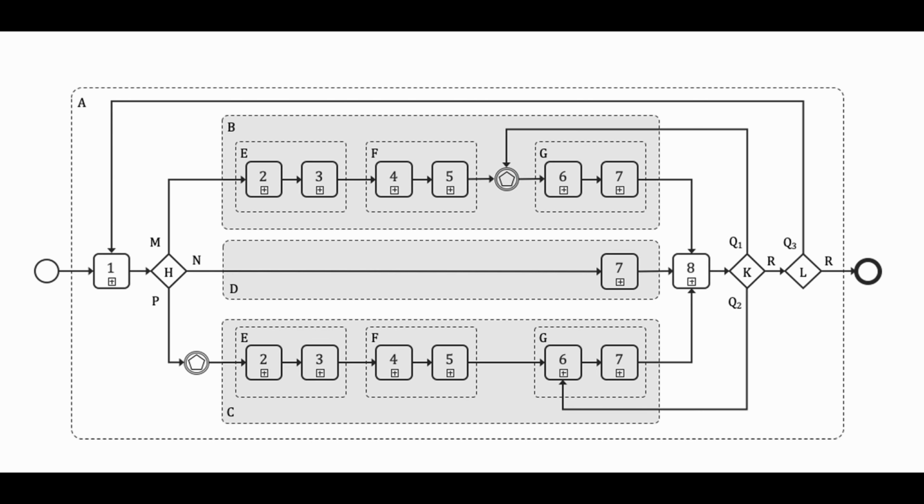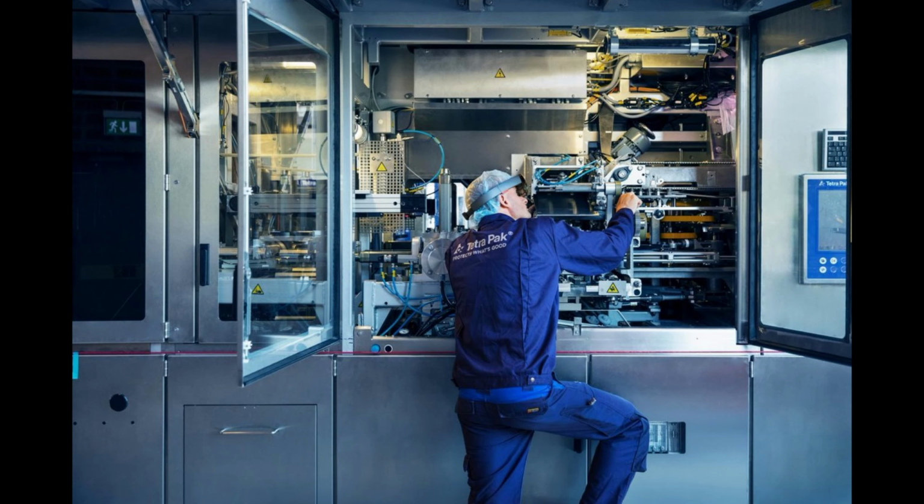8 steps to preparing an asset information model. In brief, ISO 19650 Part 3 retains the 8-stage process familiar from Part 2 of the standard. Assessment and need. Invitation to tender. Response. Appointment. Mobilization. Information production. Information acceptance by the appointing party. Aggregation into the AIM.